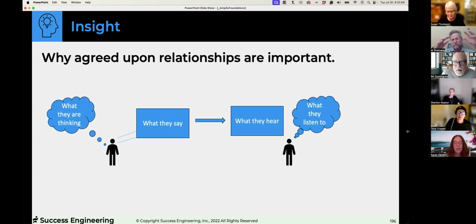Sometimes I've had people make these really big boards that represent the way the whole organization works, and you use what's called a visual control. So let me explain two terms here that are very important. I think it was Alistair Cockburn who first started talking about information radiators. In information radiators, I have a team that's doing stuff and they want to explain to others what's going on. So they have all the things that are being worked on listed. If you go to an airport, if you look at the incoming and the outgoing arrivals, departures, that's an information radiator. You can see what's coming in, what's going out. You cannot see what's going on with any, you just get the data.